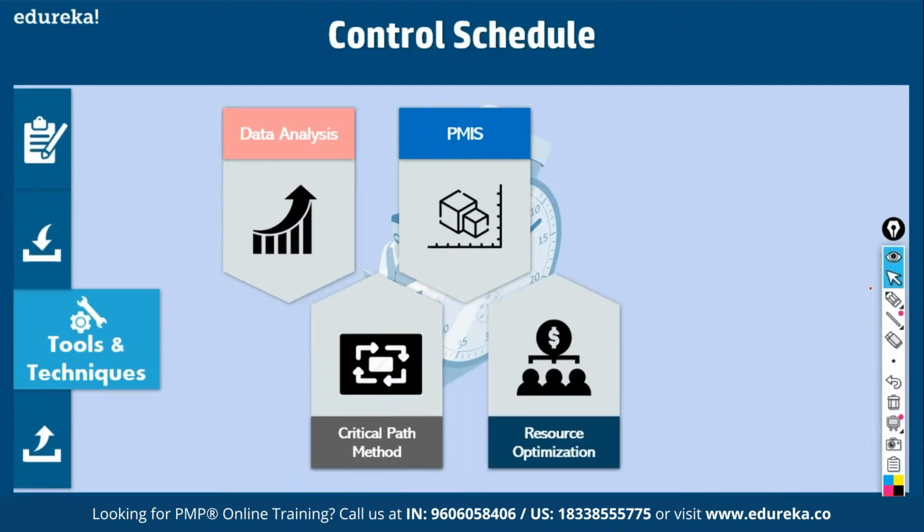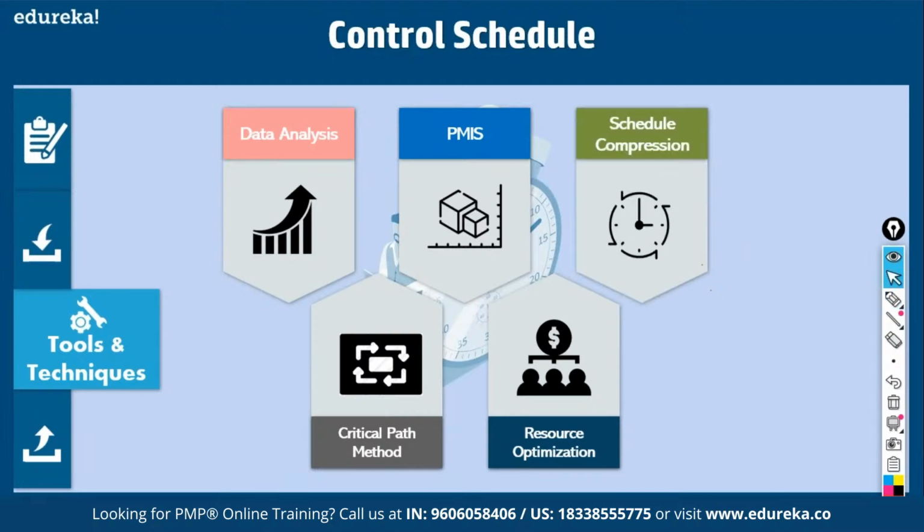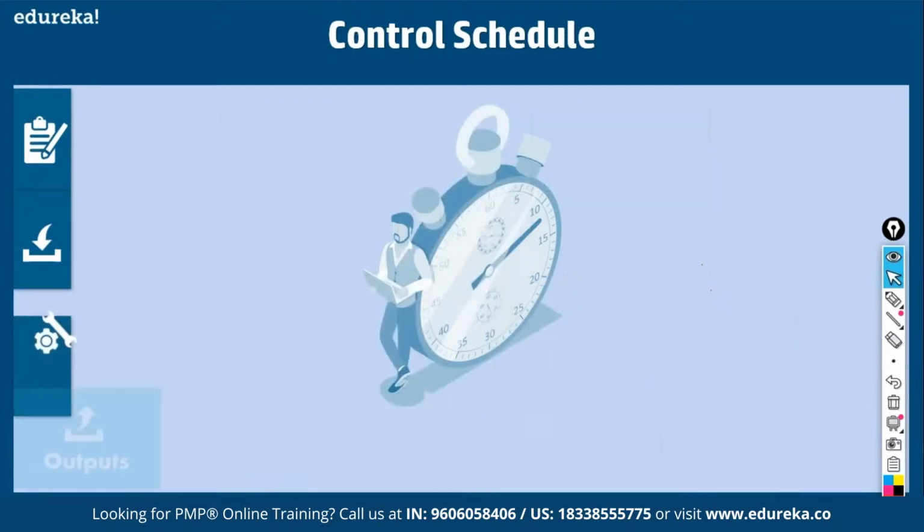What is resource optimization? For example, I told you John might be allocated 16 hours of work. So you make sure he does it in 2 days. That is called optimization. Fine. And what happens in this process? Just a moment. Schedule compression. I told you fast tracking, doing activities in parallel, right? Then leads and lags can be employed. Lead will have the effect of advancing an activity, isn't it, right? If you advance a successor activity, it'll reduce the duration of the project, isn't it?